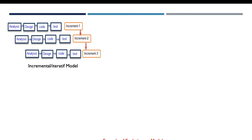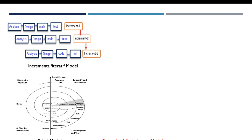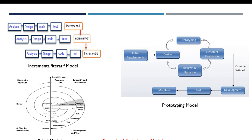As examples of the evolutionary model: first, the incremental-iterative model, where increments are evolved through iteration to compose the final release. Second, the spiral model, which is also evolutionary — prototypes evolve through iteration to generate the final release. Third, the prototyping model, where we iterate through a cycle generating many prototypes until the customer is satisfied, at which point we implement the real release.